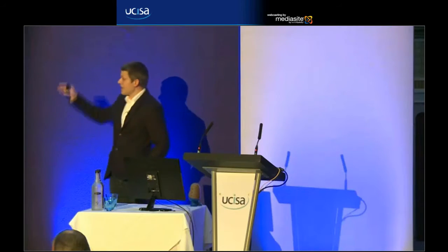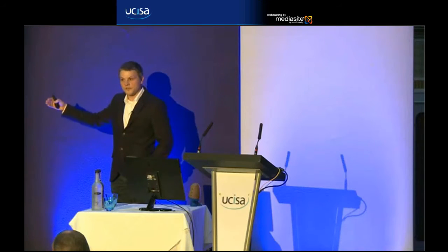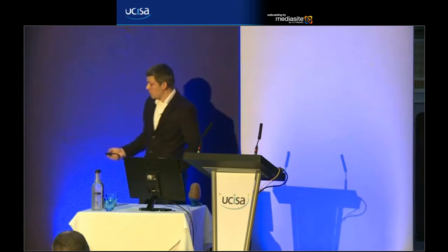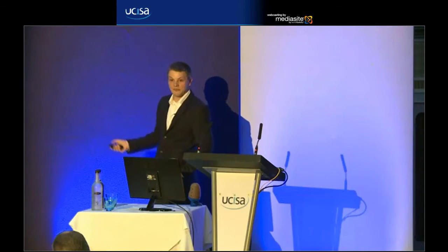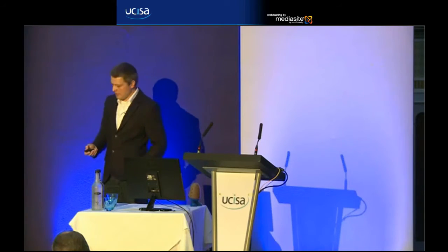As a team leader, I can watch this chart. As people are working on things, as they close off the tasks that they've got to do, the number of points for those tasks come off. So the chart, as you can see, goes down. As a team leader, I can look at this and say, yeah, everything's progressing okay.